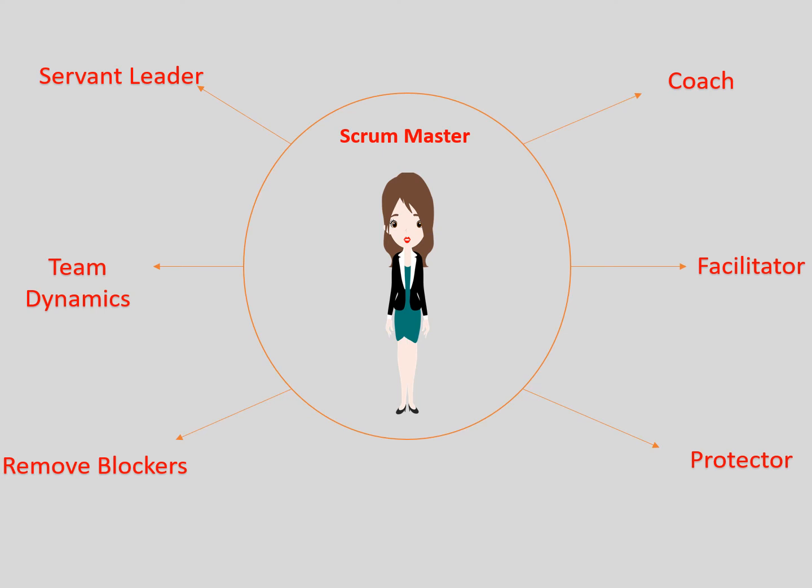The Scrum Master serves the Scrum team in several ways, helping the Scrum team focus on creating high-value increments. Coaching the team members in self-management, so wherever it is possible, the team should resolve impediments. Coaching the team on Scrum principles and best practices. He may facilitate meetings and helps keep the Scrum team on track, productive, and growing. He facilitates the Scrum events and ensures that the meetings are time-boxed. Scrum Master protects the team from inside or outside distractions.